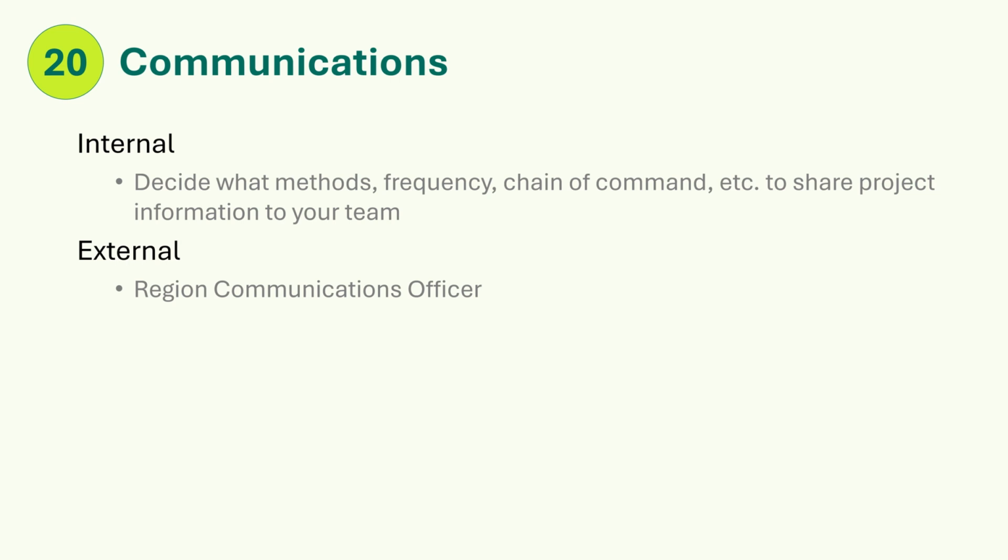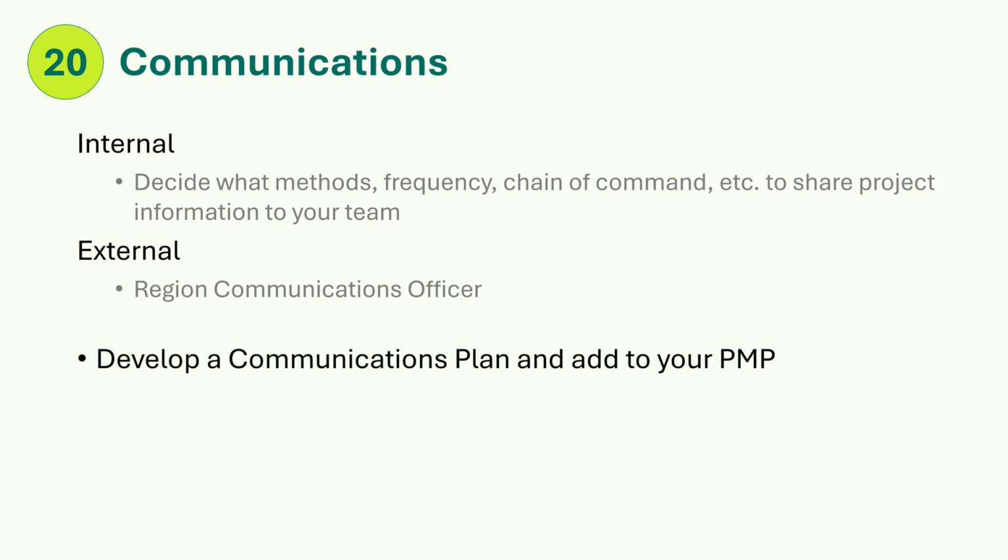Consult your region public information officer for recommendations on public engagement, possible open houses, addressing public comments, and public requests for information. Work with your region communications team to develop a communications plan. This plan will include internal and external communications. Add this to your PMP.